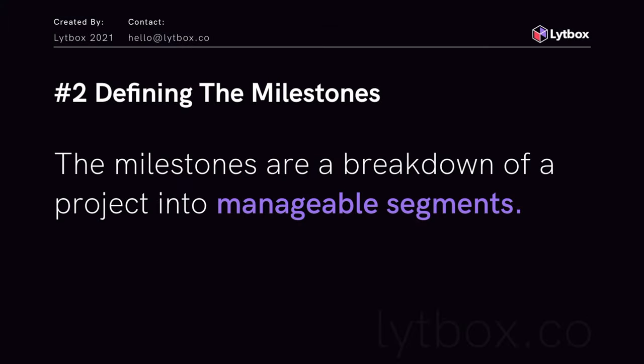So have that in place: policy, procedures, project orders. Defining the milestones. Every project should have milestones, whether it's big or small. The milestones are going to be short goals throughout the project, short finish lines. So you break it down. We could do phase one, phase two, phase three. And each one of these should have a payment added to it. For example, a milestone could be we complete the design. Once the design is completed, a milestone is completed, we collect a portion of the payment.